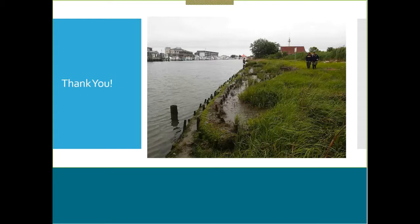Other than that, the project looks pretty good. I would want to see the actual linear feet of shoreline protection. I know you said you're less than 500 feet, but we just want to see the actual number because obviously we do have that threshold, but the threshold can be waived if determined to still have minimal impacts. So just some things to consider. And you'd like that linear footage to be put on the design map? Yeah, or just in the project description or cover letter or what have you.